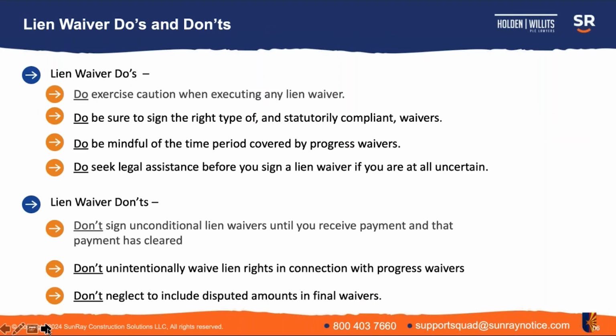So, lien waivers, do's and don'ts. First, do exercise caution when executing any lien waiver. There are several steps you've got to go through to make sure that you're signing the right type of waiver and that you're not unwittingly waiving lien rights that you may otherwise have. First, be sure to use and sign the right type of, and statutory compliant, waiver.